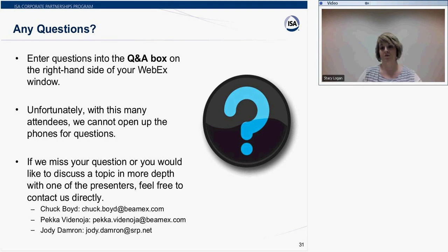So there are a lot of different ways you can justify a project. Typically, to build a business case, we would engage in a gap analysis. You have a general idea of what you want to do, and maybe some possible solutions, but the gap analysis is a really easy tool to use to identify where your current state is and where your future state is that you want to reach, and also the tasks you need to accomplish to get there.